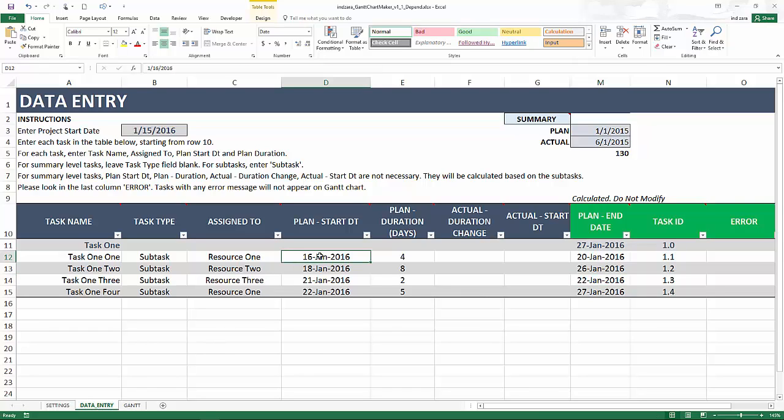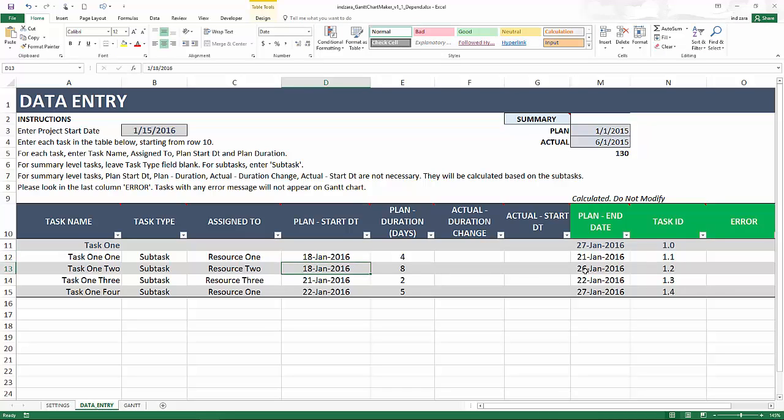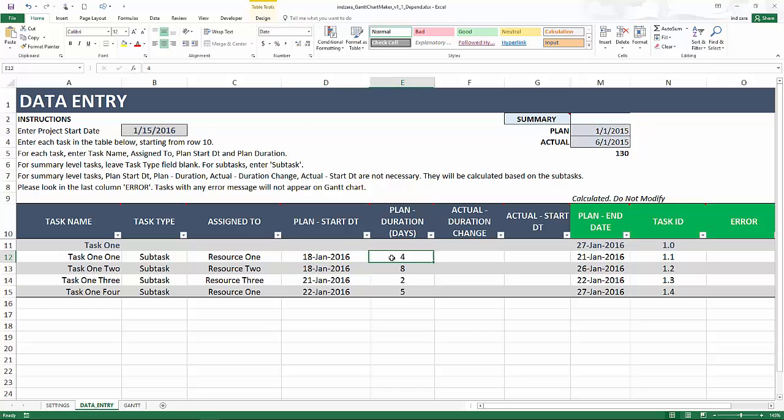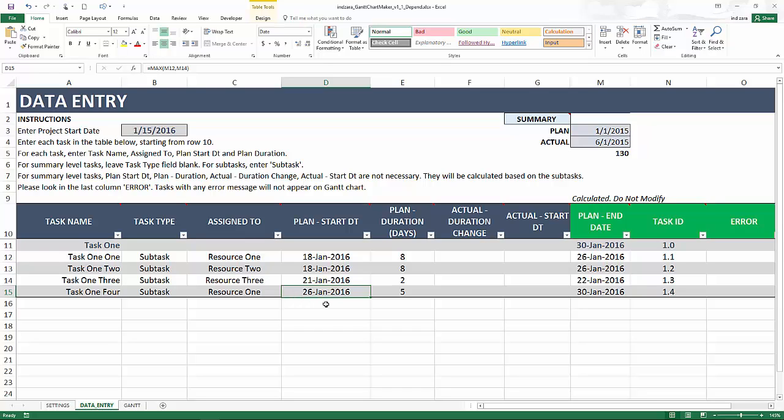Let's say this one instead of starting on the 16th, it starts only on the 18th. So I'm going to put 18th and immediately this changes to 21st, but your start date for this has not changed because it's picking the maximum. Let's say you change the duration of this to eight days. Now you will see that the end date for this task moves to the 26th. Immediately the start date of task 1.4 also is updated to the 26th because we want to pick the maximum of the two.